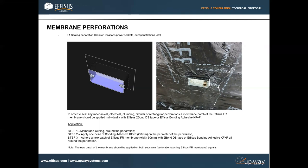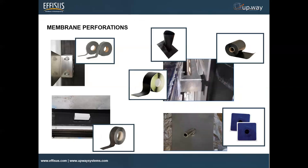If you don't give them all the details, instructions and information, you might compromise the quality of your facade and vapor membrane application. Our simple step-by-step guide covers how to cut the membrane around the perforation, what kind of product to apply on the perimeter of the perforation, how to place the patch, and what product to use to bond the patch. We explain everything and go into detail for all the membrane perforations you might have on your project.